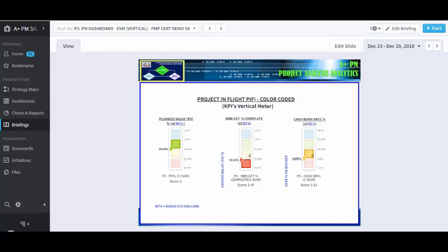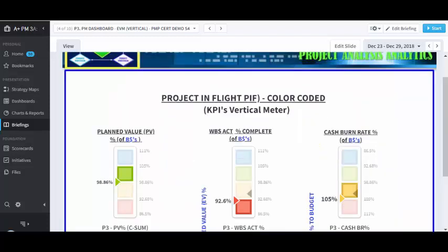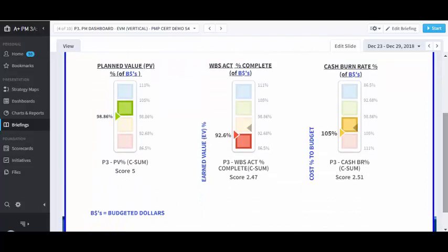Now, the scaling is against plan value, right? But if you're at 98.86, that only leaves you approximately 1.14% cash left. Well, you don't know, but I know the project was supposed to be completed the latter part of February, which means there's going to be an overrun. So the key is going to be whether or not the overrun is going to be within the acceptable parameters